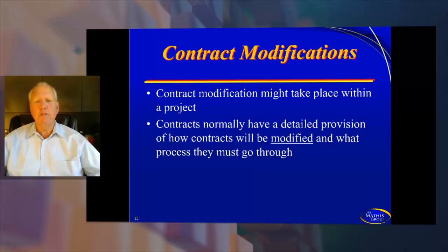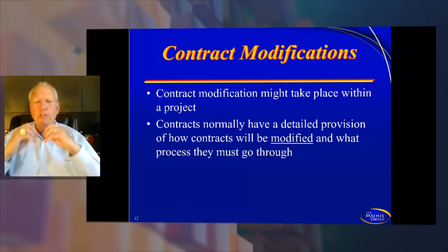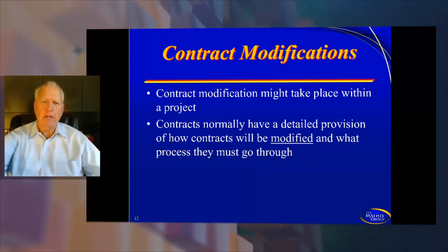So there's nothing to really modify. Time and materials are in the same boat. With time and materials, you're normally paying by the hour, and so it just means more hours for that vendor. But if you're in a fixed price contract, you will find yourself using that tool and having to change that tool to accommodate the change orders that the buyer is wanting to instigate.